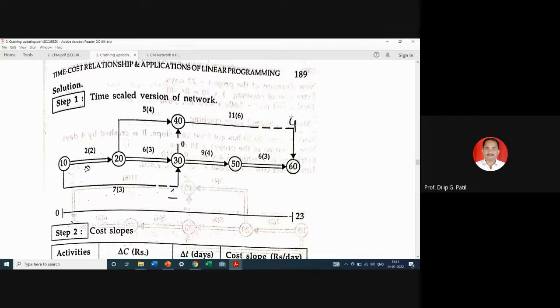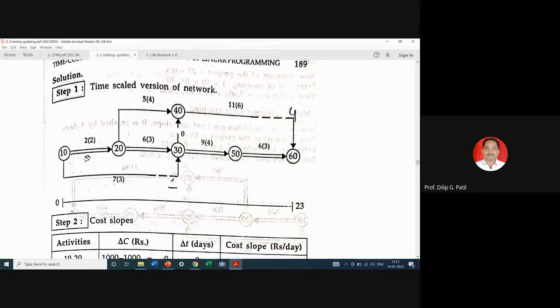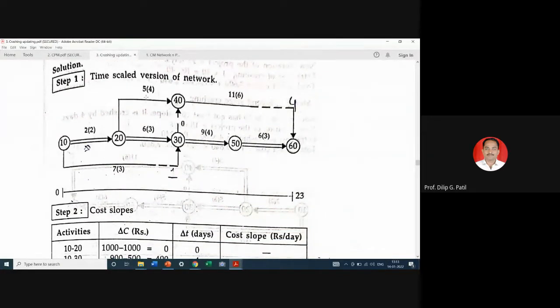So this 4 slack is also correct, because we are comparing it with the 9 + 6, that is 15, and here is 11. So 15 - 11, that is 4. So here is 4. So accordingly here will be availability of 1 day extra time. So here you can see that there will be extra time available as 1, or combinedly there will be here as 5.